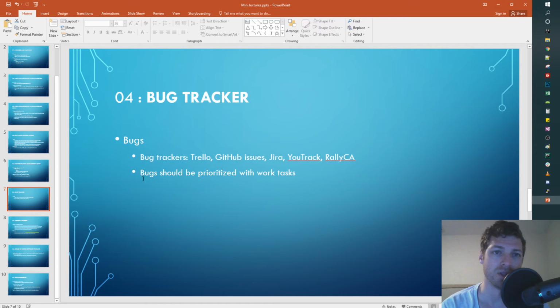When you do a story, maybe you have a task for high level requirements, low level requirements, your design, doing the code, doing the test, doing the reviews, and all that stuff. Based off of that, those are little tasks that if you collect them all in the whole project, you can get a feeling of percent complete.